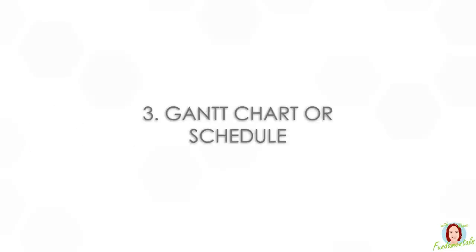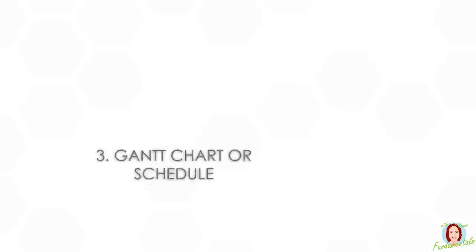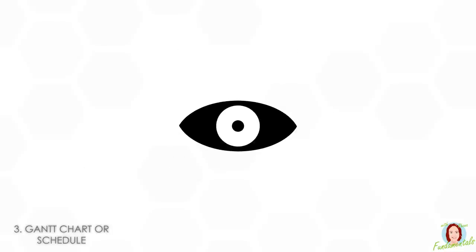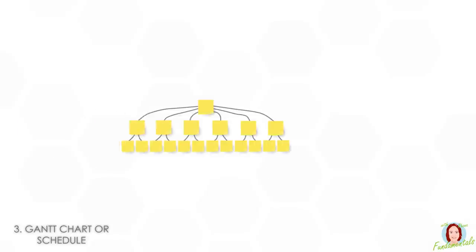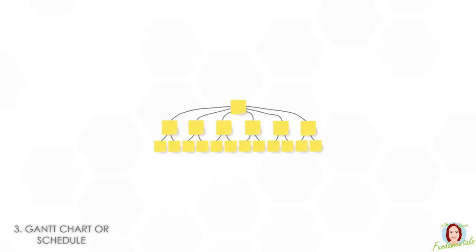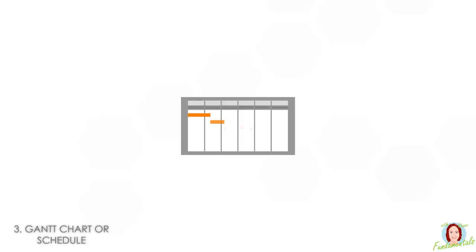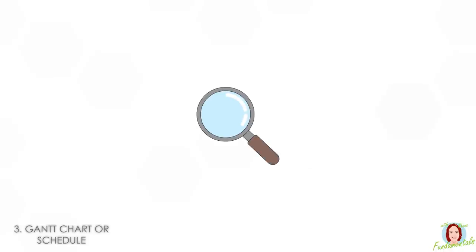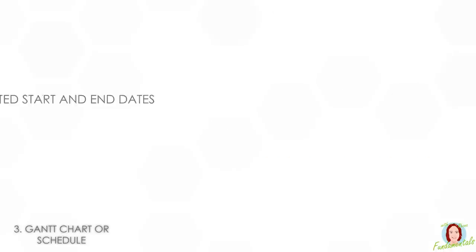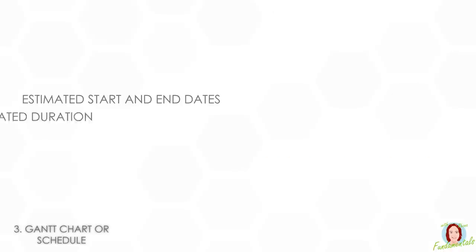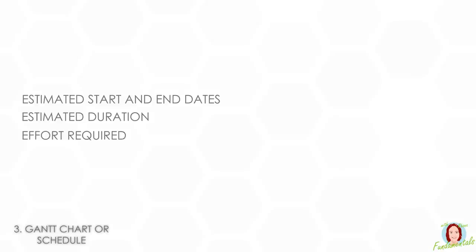Number three, Gantt chart or schedule. This is a specific way to visualize the work that's needed to deliver the project. This falls out of the work you've done with the work breakdown structure. It's taking everything you've done and putting it into logical flow with links between tasks. You add more detail at this point, so you may have estimated start and end dates, duration, effort needed, and relative progress.